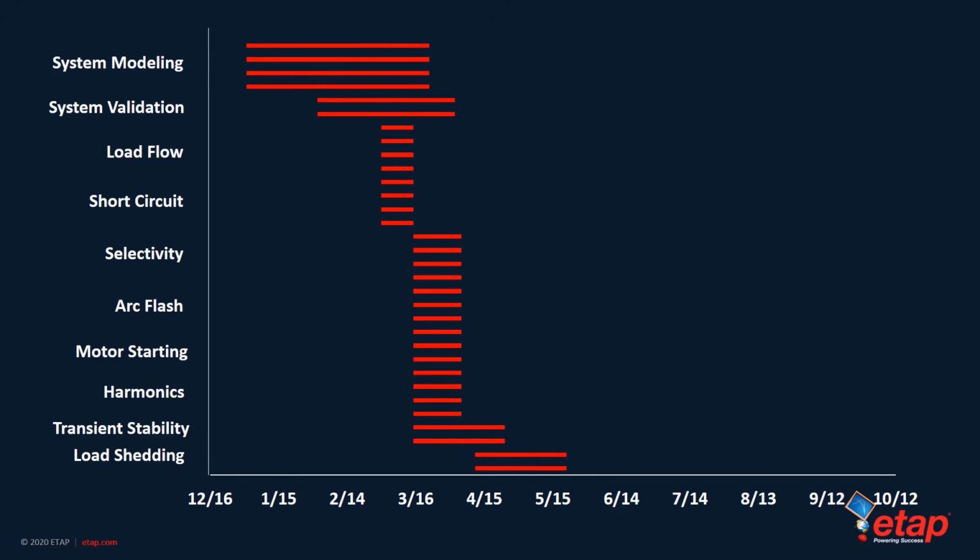With our new project schedule, we have multiple individuals working on the project at the same time and submitting their updates so all affected engineers can work off the latest model, as to have it updated and validated at all times. Also, the modeling, validation, and engineering phases are reduced further by utilizing the solutions we are about to present. This reduces the timeline of this project by nearly 5 months. It is now time to learn about the technology that gets us there.